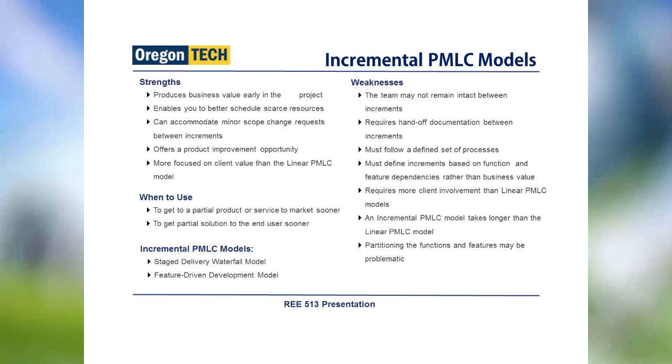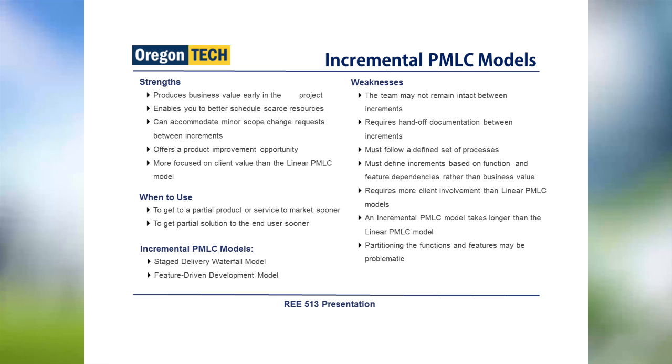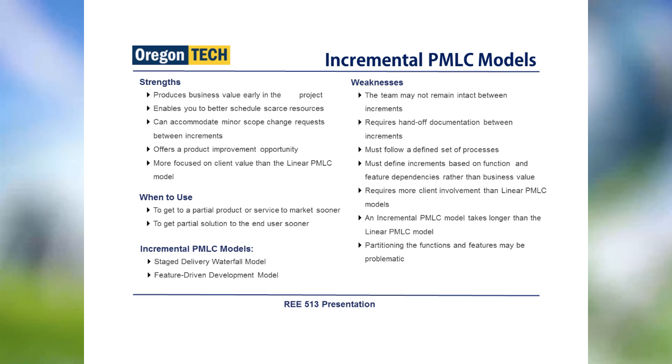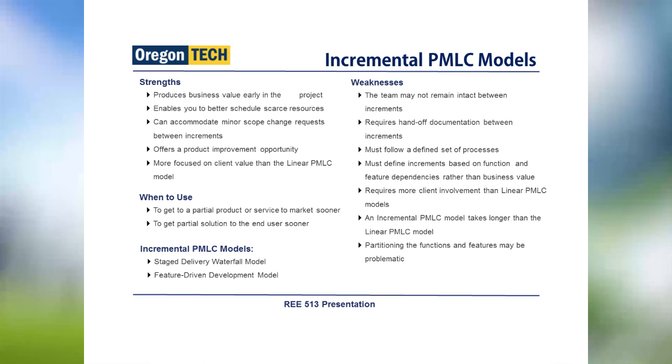The good thing is you can deliver a partial solution to the end user and get their feedback. In this way, we can get the product to market faster. However, it requires more client involvement than the linear PMLC model. Sometimes it is hard to divide a project into many deliverable stages. Two types of incremental PMLC model are the staged delivery waterfall model and the feature-driven development model.